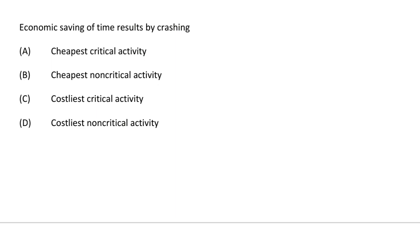Next question: economic saving of time results by crashing the — option A cheapest critical activity, option B cheapest non-critical activity, option C costliest critical activity, option D costliest non-critical activity. The correct answer is option A, cheapest critical activity. We will see the next video — thank you.